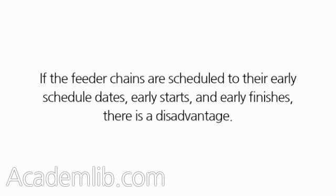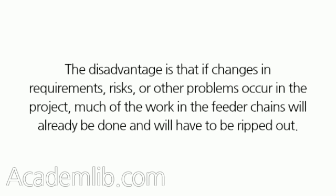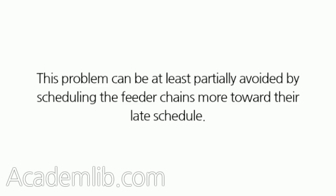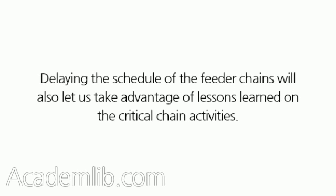The disadvantage is that if changes in requirements, risks, or other problems occur in the project, much of the work in the feeder chains will already be done and will have to be ripped out. This problem can be at least partially avoided by scheduling the feeder chains more toward their late schedule. Delaying the schedule of the feeder chains will also let us take advantage of lessons learned on the critical chain activities, which can then be applied to the feeder chain activities.